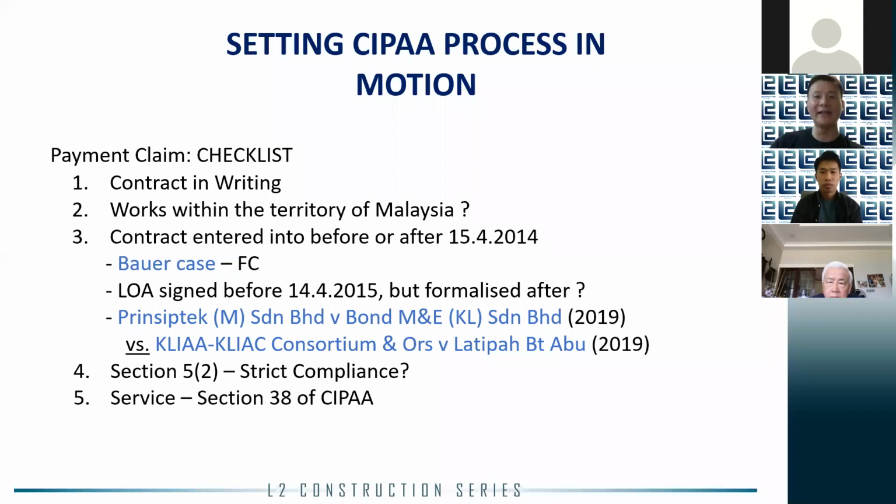And because of that, the court finds that there was actually a replacement contract. And because there was a replacement contract which falls within the parameters of CIPAA, because it came after 15th of April 2014, the court recognized the contract as falling within CIPAA, and the decision was upheld. Now, these are the 2 borderline cases which you can use as a reference if you fall within this borderline situation.